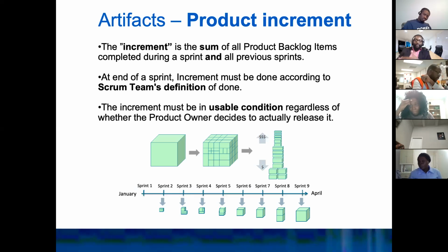So what I explained on the slide is the number of sprints that you have. Every time you're creating a sprint, you have something that comes out, and you see that every time you're producing the next product increment, it is getting bigger. Why? Because everything that you designed before gets into what you're designing now as an input. You add to it, you integrate it, and then it gives you your next product increment. So the first sprint, I should have had something here because every sprint you need to produce a product increment, okay?